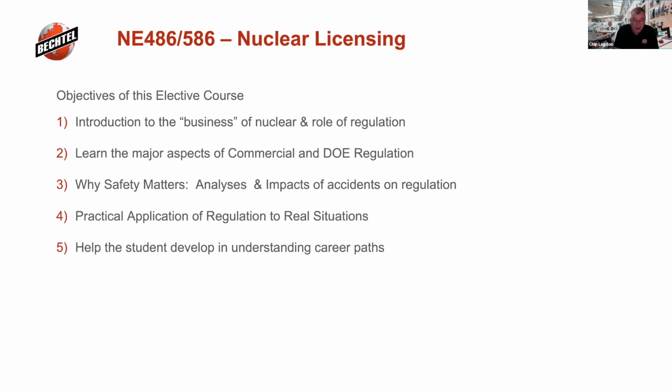And really what you find out when you start looking at the problem and you look at the curriculums that are going through the nuclear engineering programs, what is missed in all of these is that nothing happens without a license. Some sort of regulatory, okay, you can go do that, whether it's a DOE approval through a documented safety analysis, or whether it's the NRC through a formal license process. That's true for medical facilities, fuel handling facilities, reactors, research reactors, all those kinds of things. Somebody's got to say, yeah, safety's good, we can move forward.